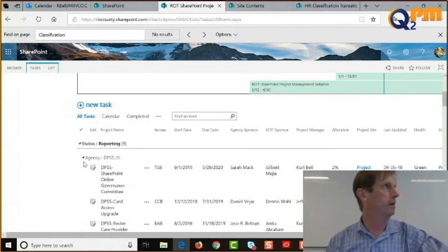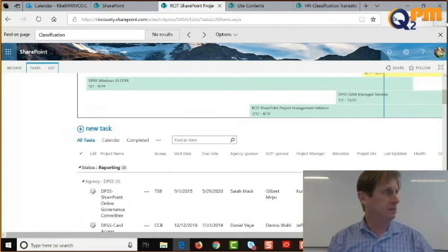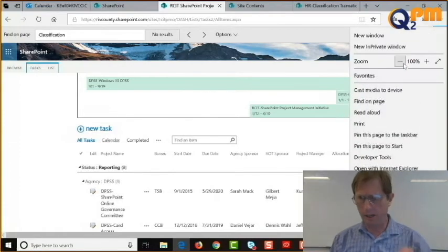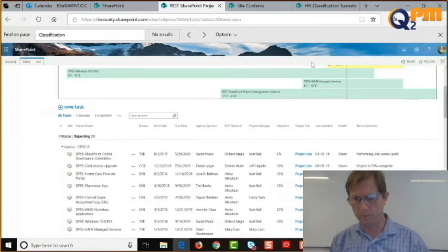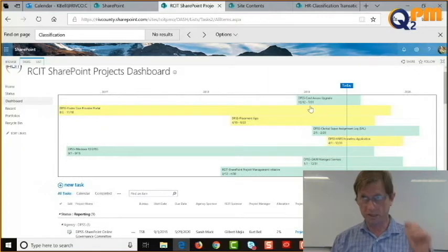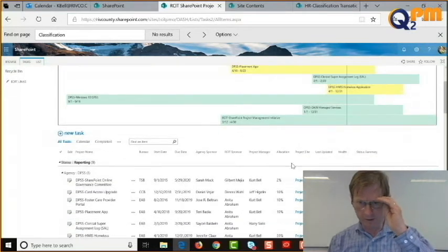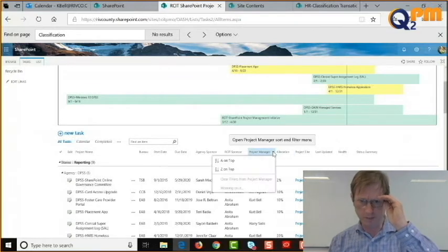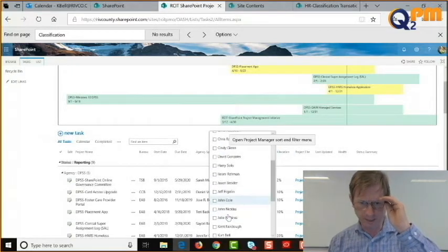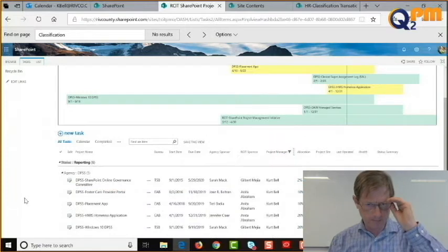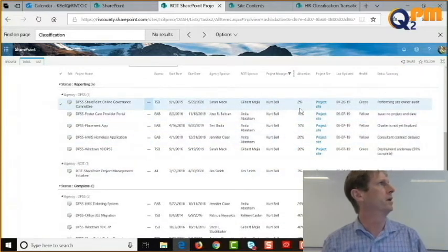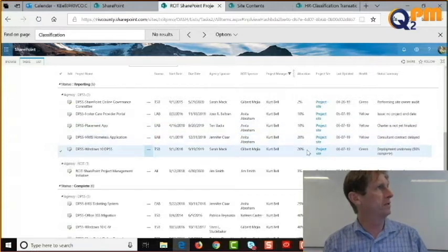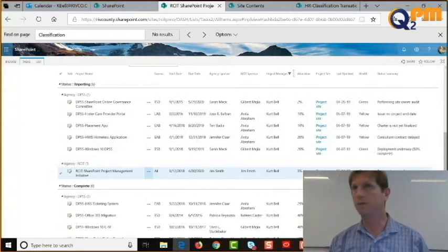That's right. But the reason that's done, I want to show you real quick. In our little methodology, the people that are a part of this team, no more than 65% of our time is supposed to be spent on projects. So if we filter now by project manager, and we filter for me, let's see how I'm doing. I have 12, 22, 32, 42, 52, 62, 65. So I'm at 65% right now.